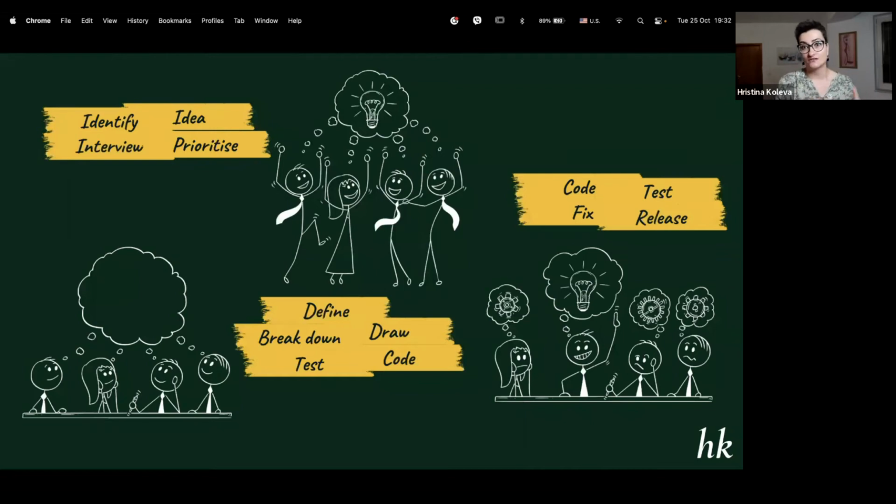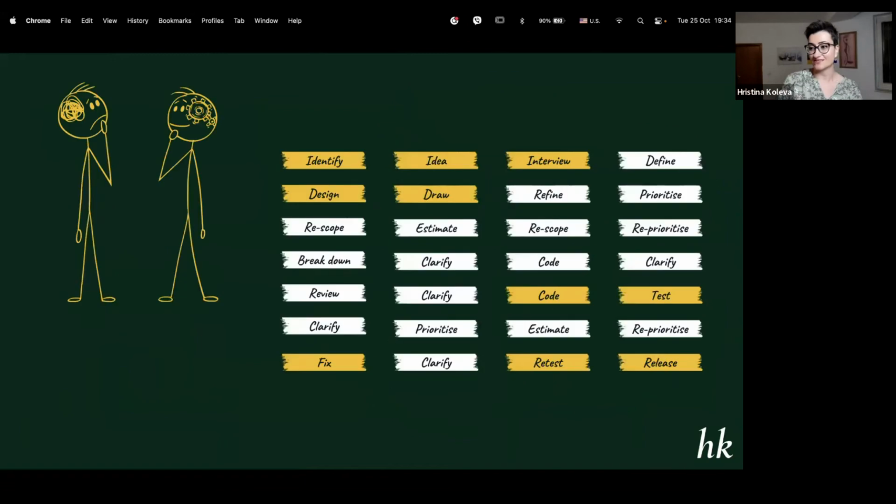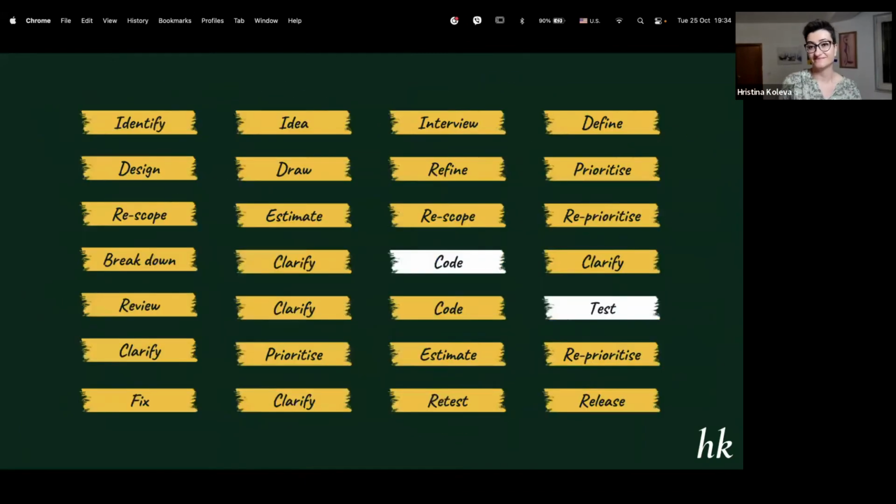Continue on the skeleton, do it in one day, do it in a couple of hours, sit together. It's not slow and it's not inefficient. On the contrary, it will result in more man hours per task, but less calendar time. And it will speed up the releases, because instead of that picture here, you will have, and all of these are separate actual stages from the development lifecycle.